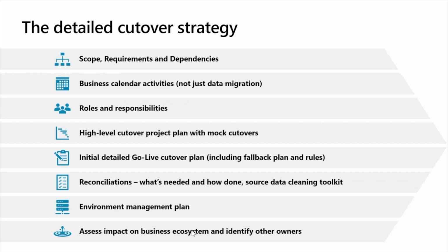You'll have a high-level cutover plan where you'll be defining the points at which you're going to do your mock cutovers, where you're going to do your data migration trials, and when you're going to have data needed for testing, training, etc. And you're going to start your more detailed go-live cutover plan, right? When you first start in the implement phase, it may not be very well fleshed out, but you're starting it at this point because you want to set the right tone, the right formal discipline for what needs to happen at the formal go-live cutover.